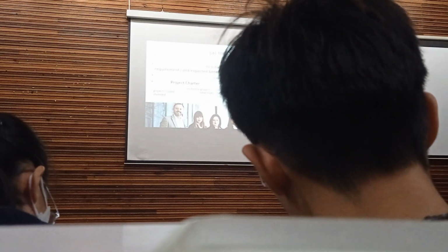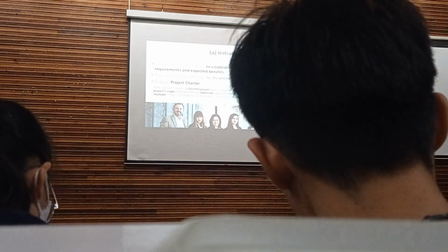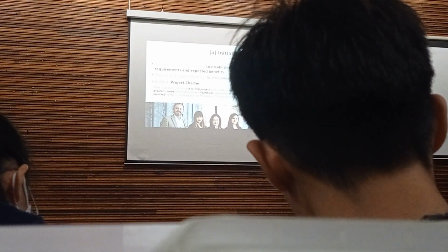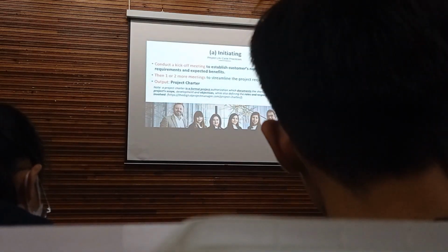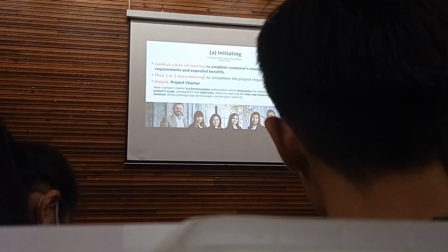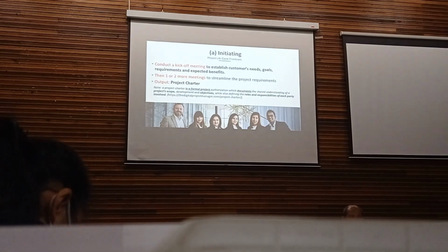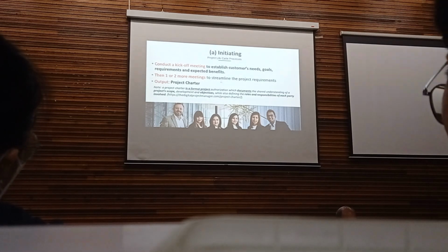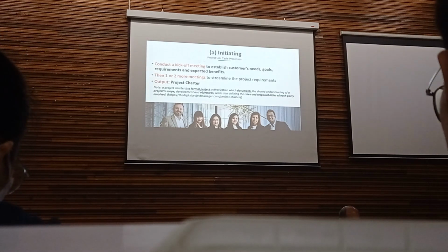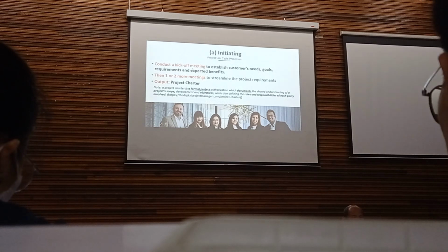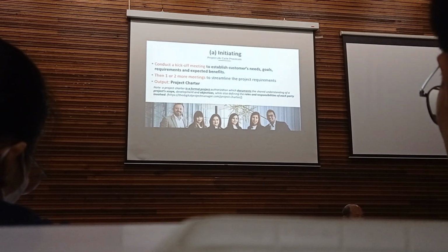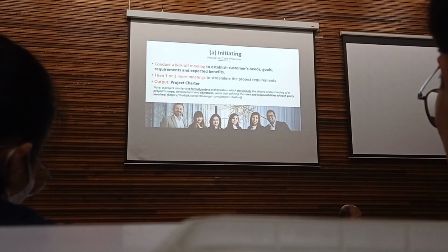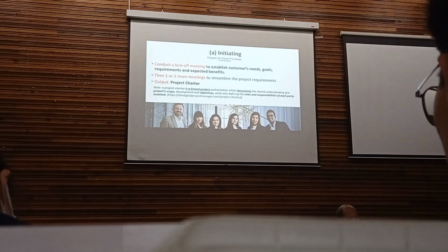So start with conduct a kick-off meeting. When a project starts, there's a kick-off meeting to establish customer needs, goals, requirements, and spell out the benefits that can be gained from the project. Then 1 or 2 more meetings to streamline the project requirements. One kick-off meeting will not be able to clearly define the project requirements, so you need 1 or 2 more meetings to fine-tune requirements.